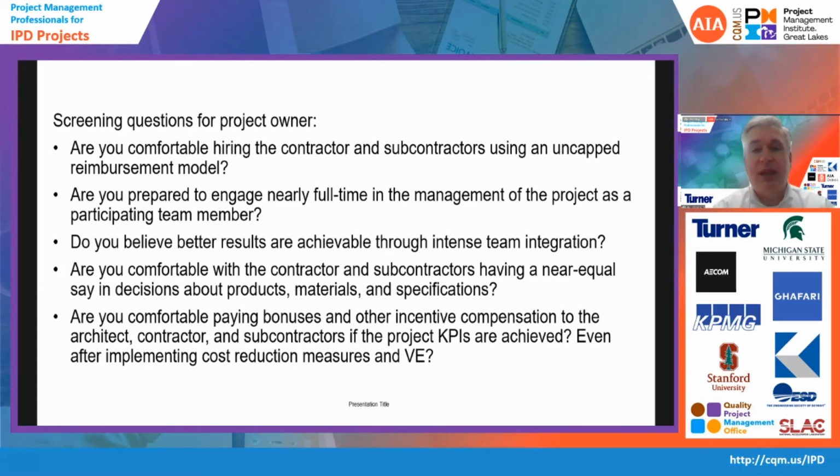Are you comfortable hiring the contractor and subcontractors using an uncapped reimbursement model? You have to be somewhat comfortable with that if you're going to do an IPD. Are you prepared to engage nearly full-time in the management of a project as a participating team member? The owner has to be at the table at almost all the meetings, to give their input, to give their insight into what they want and to help make decisions as part of the management team. Do you believe better results are achievable through intense team integration? In my mind, the owner really has to believe that in order to want to do an IPD.